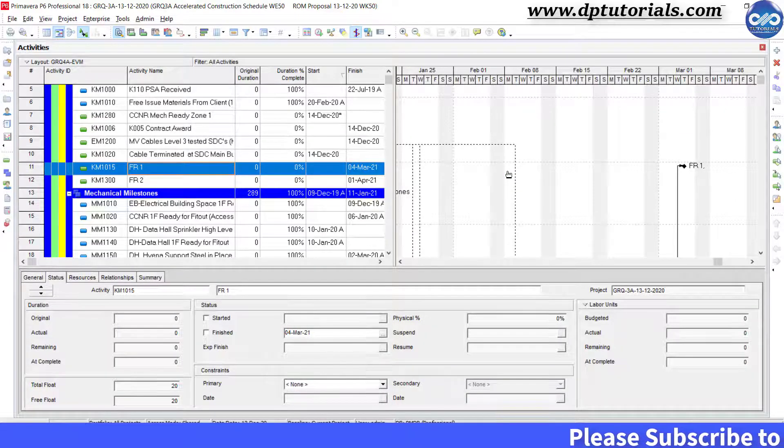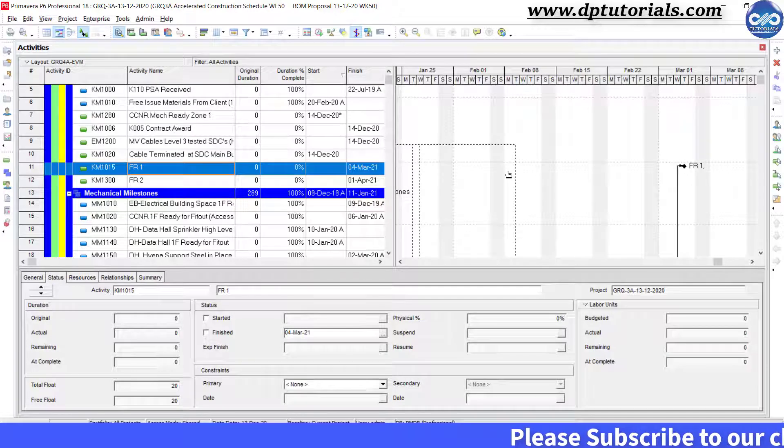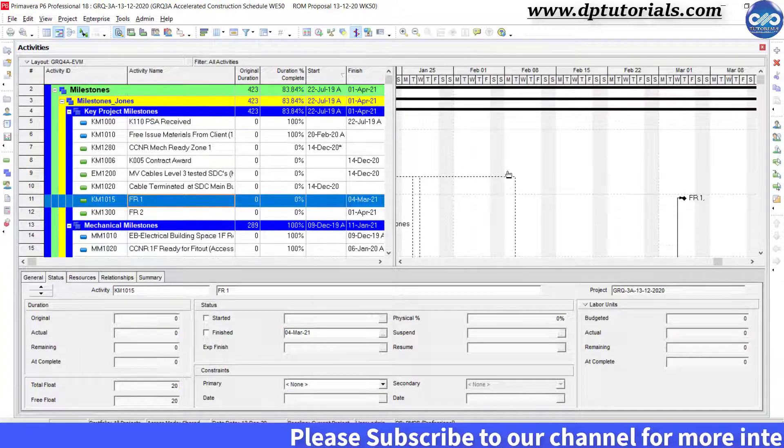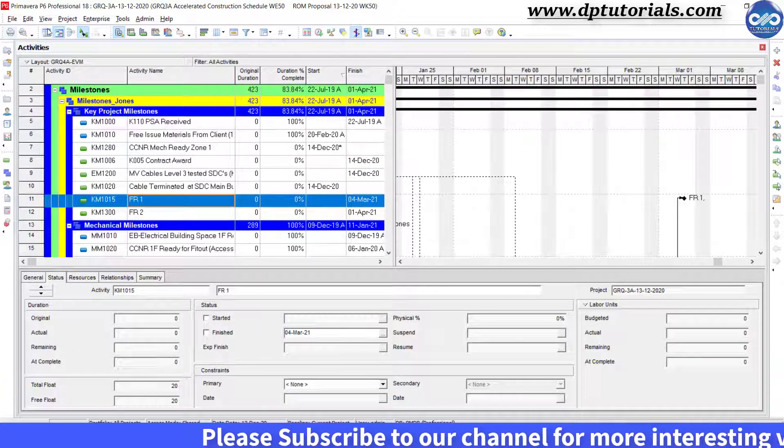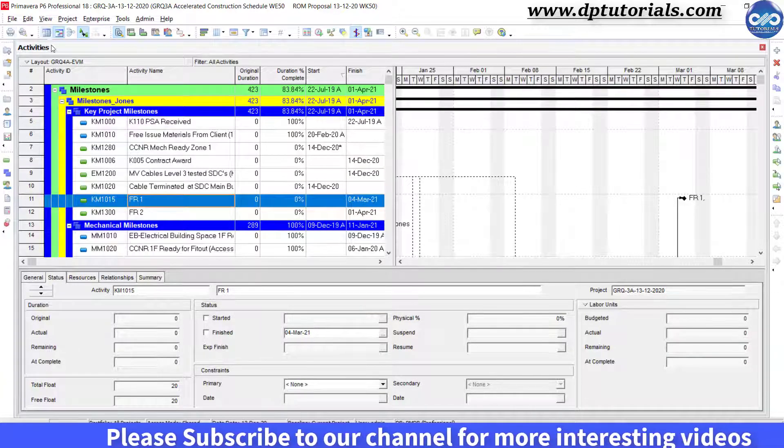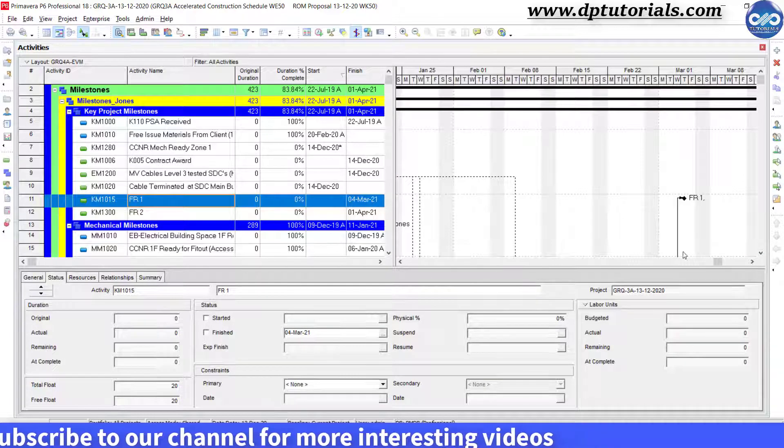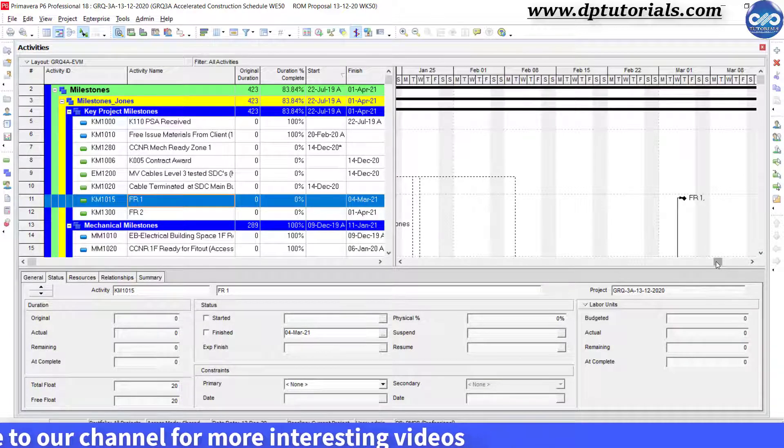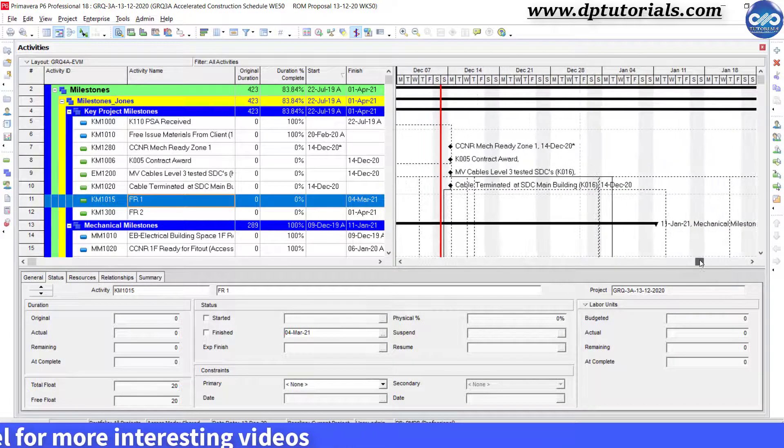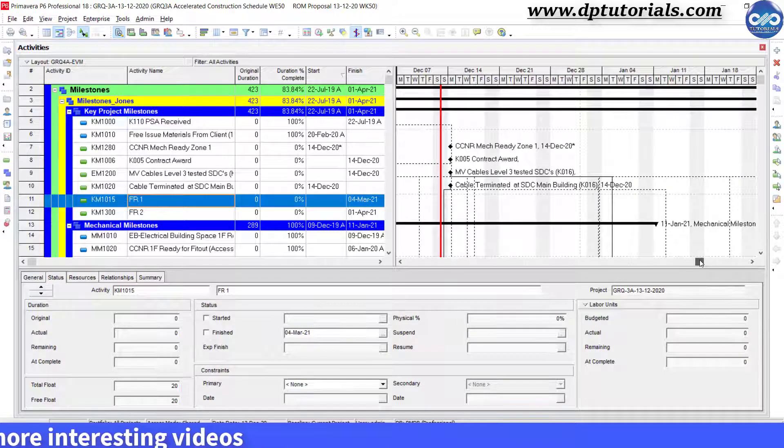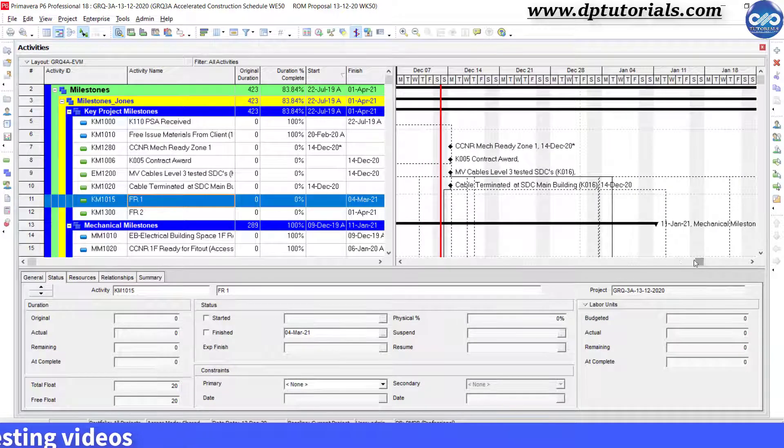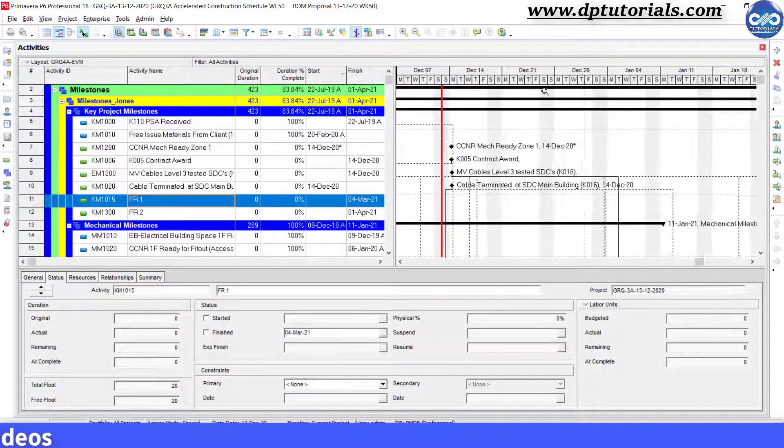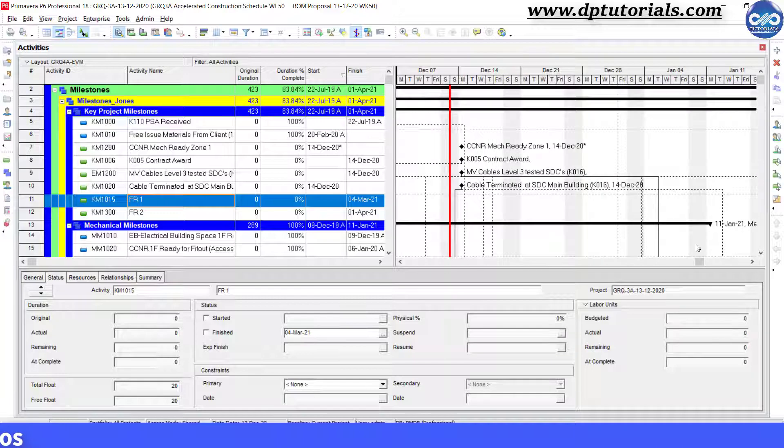Now let us see the other option of attachment that is curtains. Suppose you want to blackout a certain period in your schedule because of some weather change or festive season. You can highlight this period as a curtain showing a non-working time.